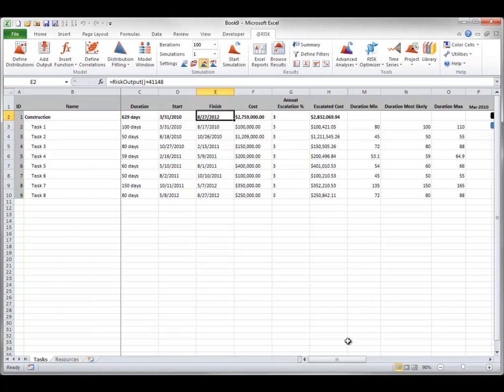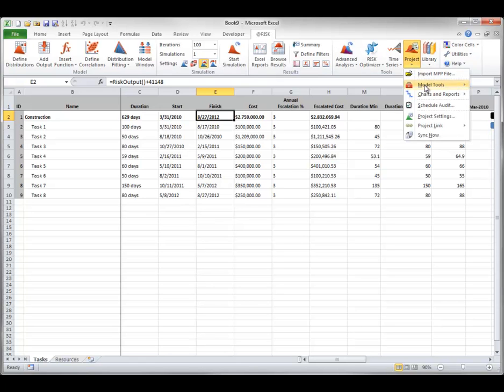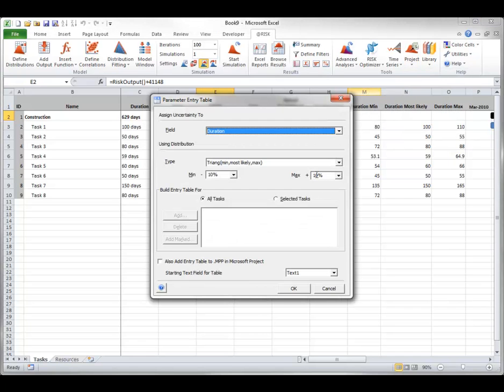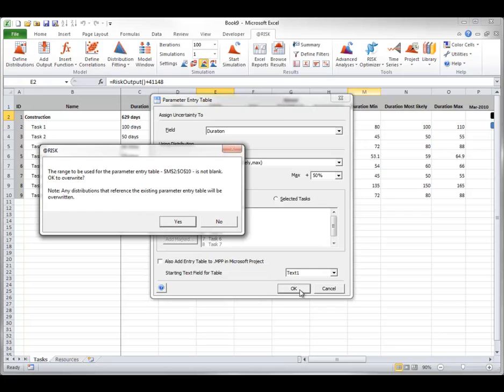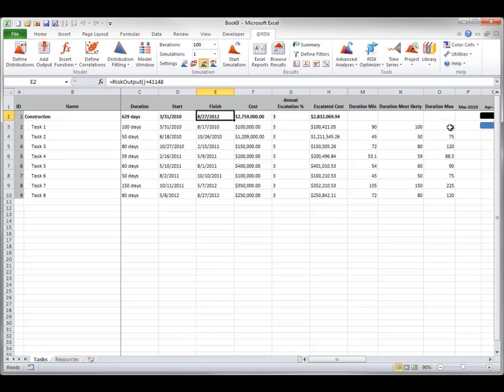It is easy to update your parameter entry table to see how simulation results change under different assumptions. For example, you might want to apply a 50% maximum rather than the previous 10% maximum to each task duration, to see how results change when there is a higher probability the tasks will take longer than expected. All I have to do is change this to 50%. Now the maximums are higher.